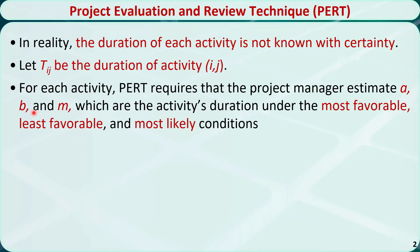B is the estimate of the activity's duration under the least favorable conditions. For example, it rains a lot, the weather is too hot for the workers to continue to work, or some needed construction materials are sold out and require a long time to be delivered. M is the estimate of the activity's duration under the most likely conditions.